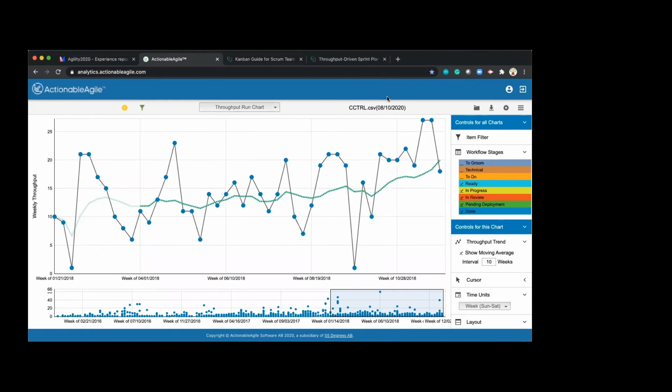Yeah, it gives a way, but I'm still thinking about how it is going to impact certain behaviors. For example, it really depends upon how well your team or the product owner is at putting together backlog items, isn't it? Because if instead of 300 items, you can put the same work in 50 items, it's going to give a different analysis. It's how you break it down.